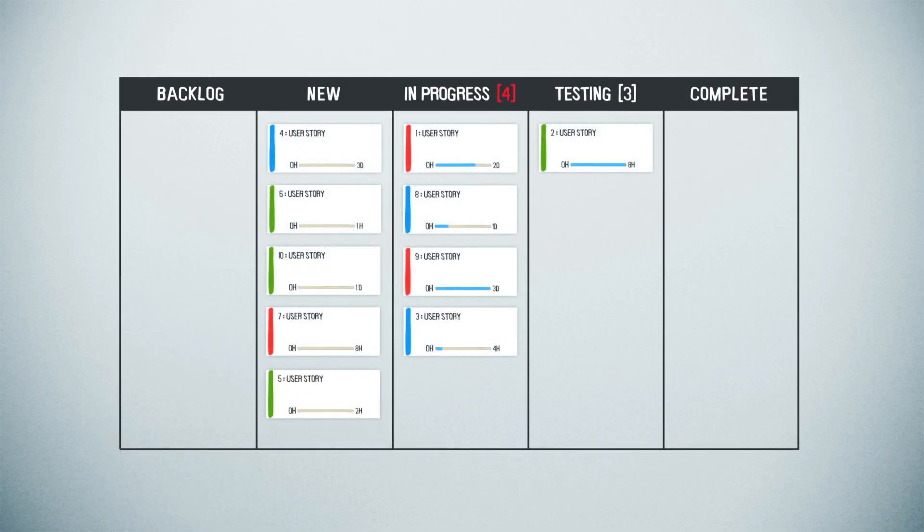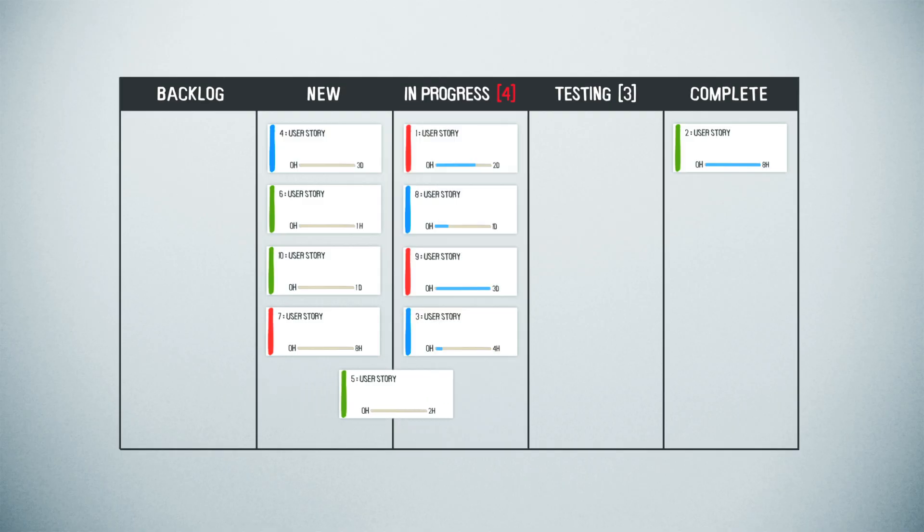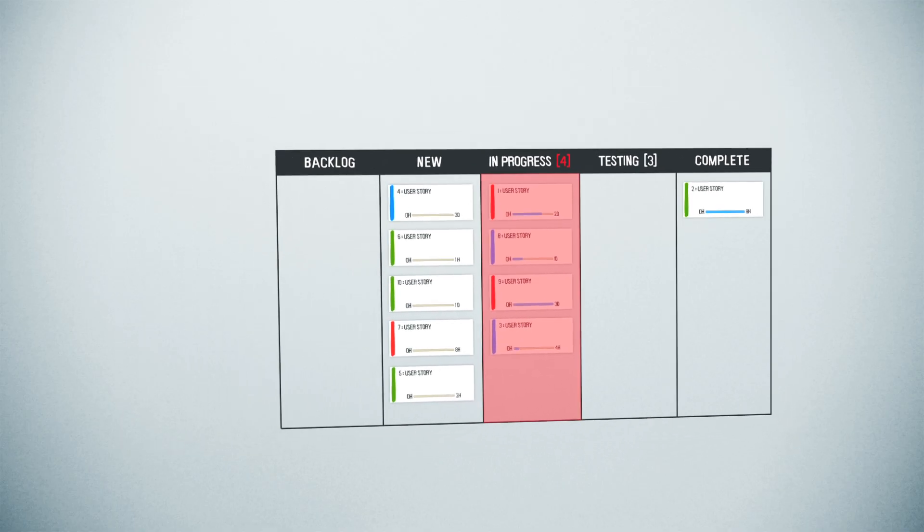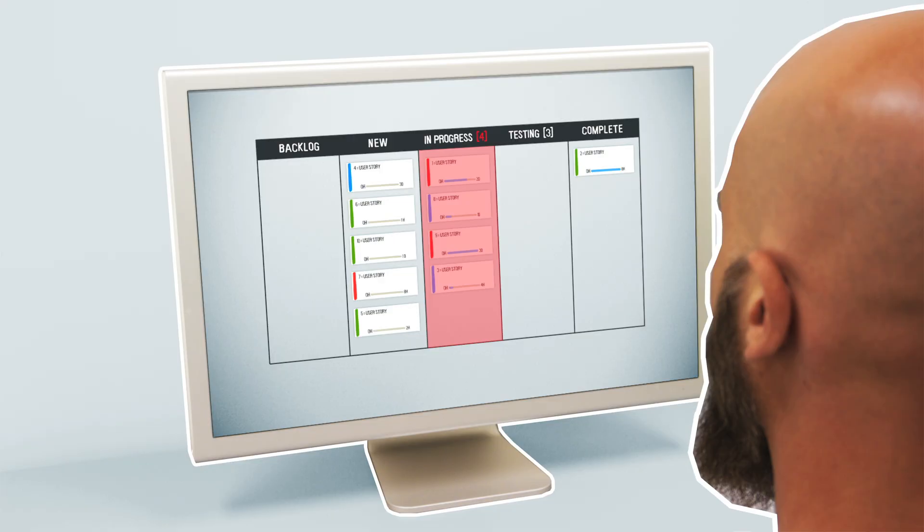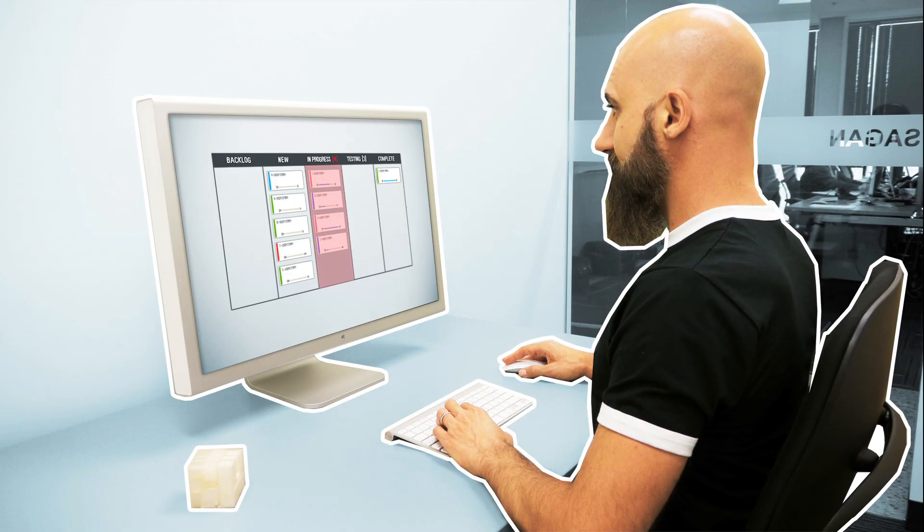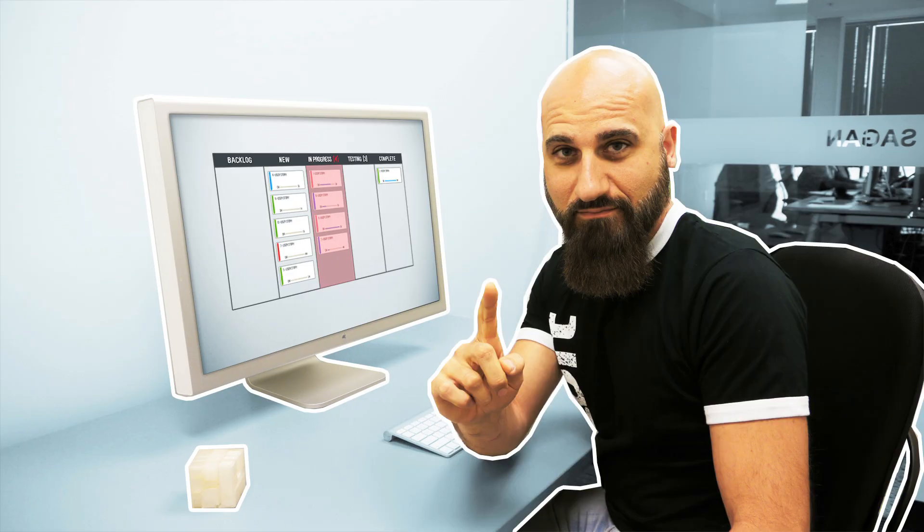If your team runs into a problem, these limits will bring it to light very quickly by creating a visible bottleneck. This allows the entire team to swarm on the problem, and that's just another way of saying collaborate.